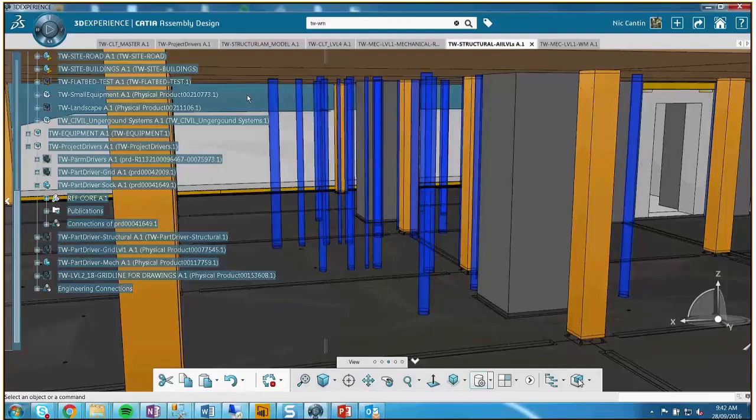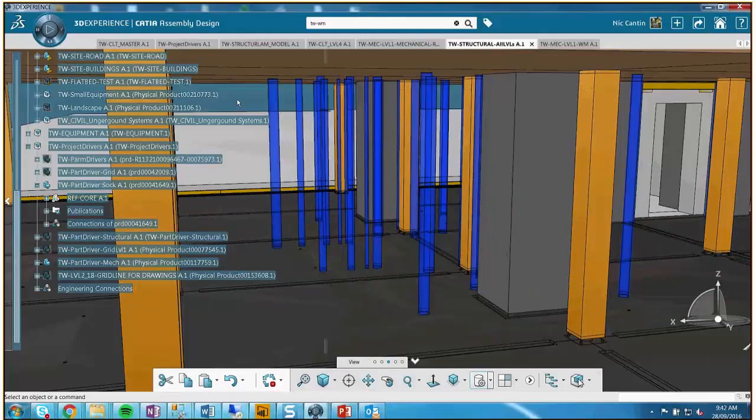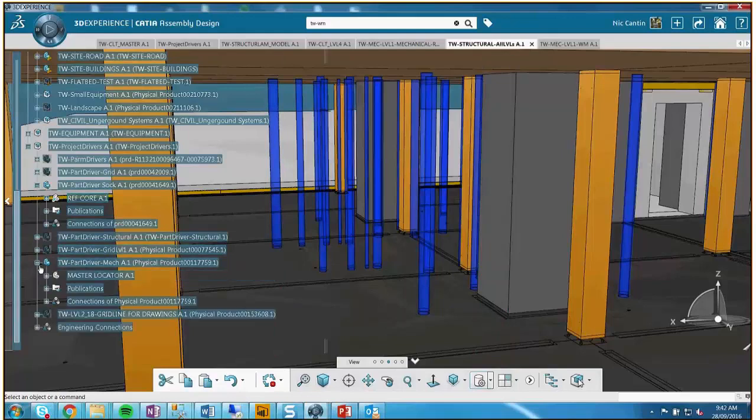For the big building, we gave them a step file. They recreated shop drawings from our model, and we reviewed it with the design team to make sure it was going to work with the rest of the building. They actually did QA/QC on every single column, I believe, and they said they did more QA/QC on this project than they've ever done. So they were doing their own internal tolerance QA/QC before it left the shop.